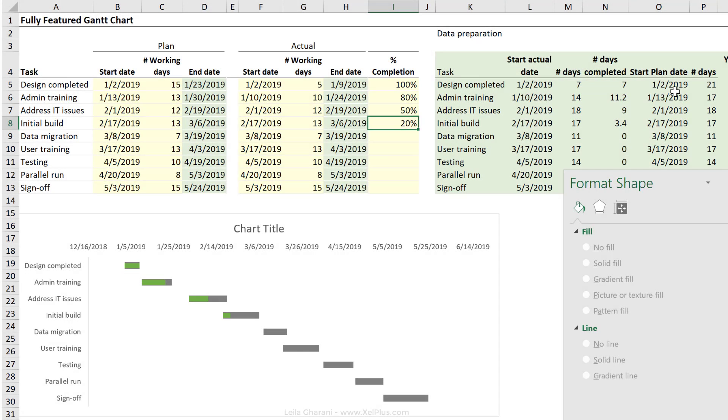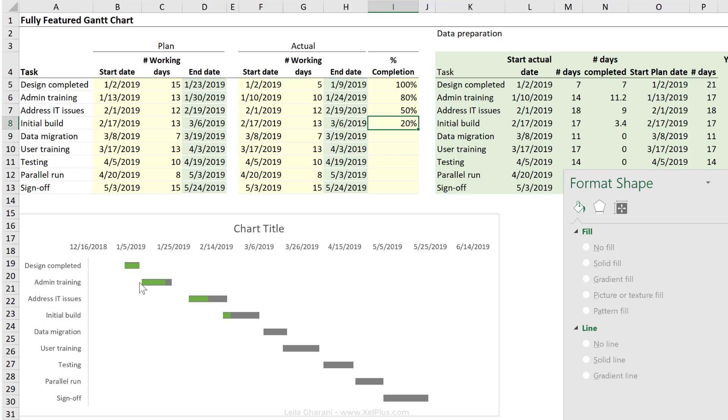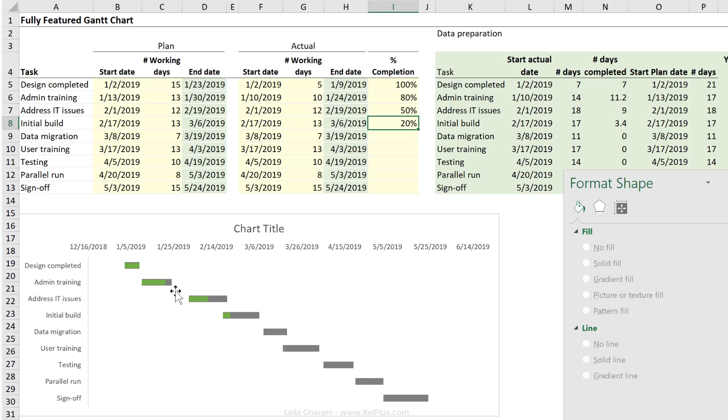So now comes the part where we're going to add the plan data to this chart. In order not to make it so confusing, I'm going to add a thinner line below the actual bars to reflect the plan. Now, here comes the tricky part. I need to plot a scatter plot here. I'm not going to use a stacked bar chart.